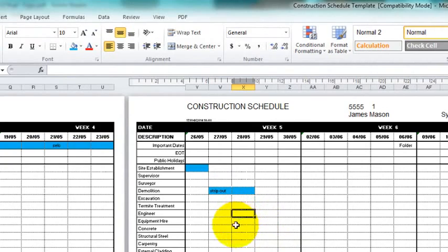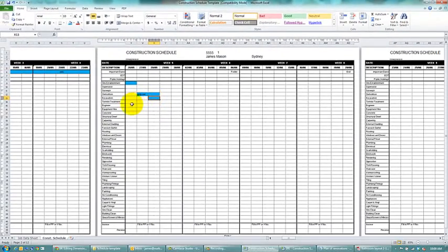We'll put in under excavation. We'll put a day there where we'll fill that. Our plumber's going to do the breaking up of the floor. So we'll come down and find our plumber. And we'll put in 2 days for him. A day to break it out and a day to actually run all the drainage and everything in. So we'll just put a note in there, drainage.